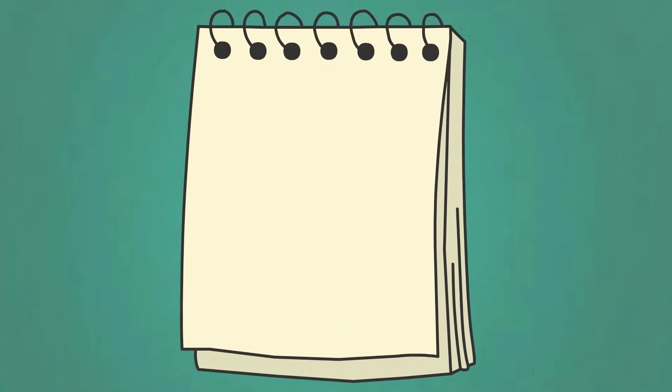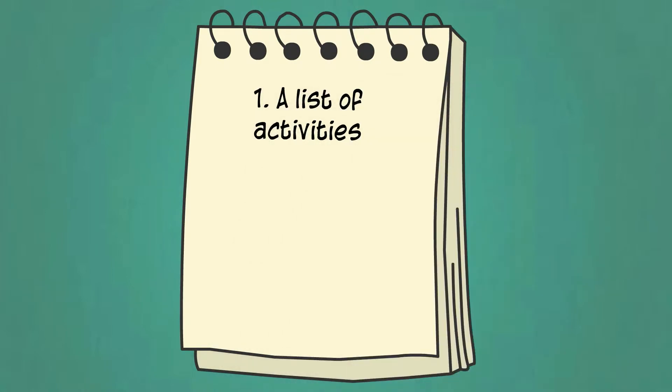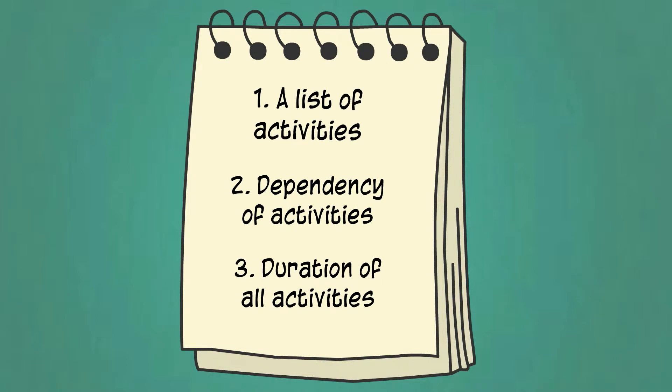To start, you need to know three things. Firstly, a list of all the activities that need to take place in order to complete the project. Secondly, which activities are dependent on each other. And thirdly, the duration it takes for each activity to individually be completed.